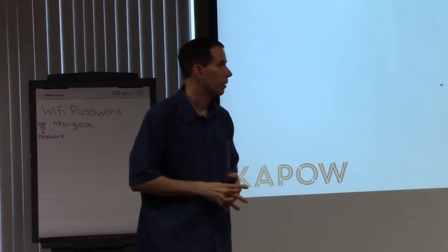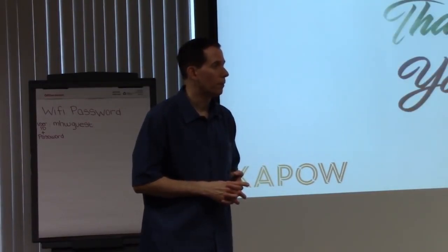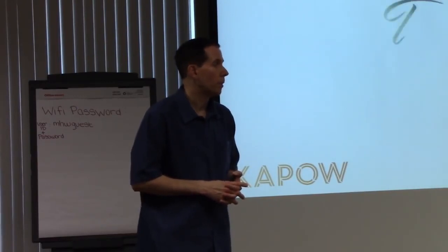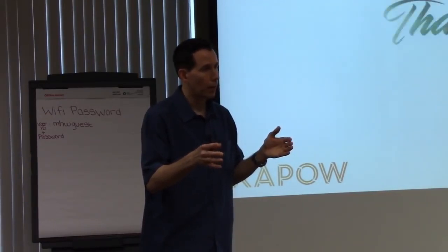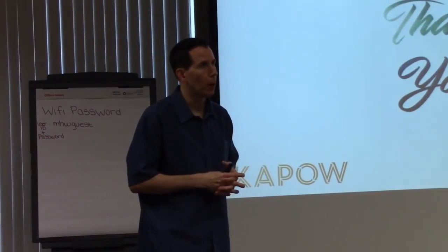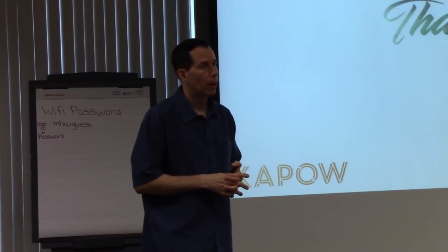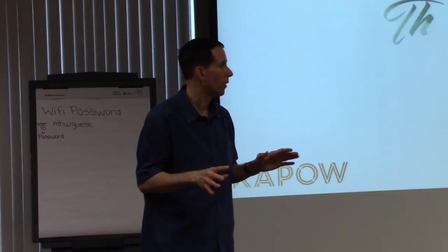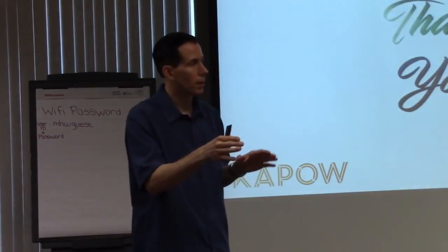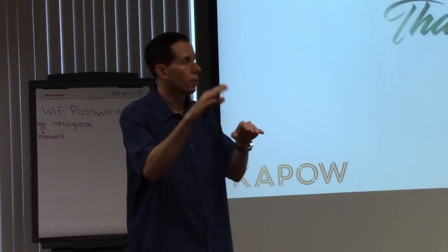It's no one particular thing, but if it's working for your group, if you feel that's enough time, it depends what your delivery is to be. We've had to split things up, but I've gotten away from it. I will tell you that, because I don't like having something partially complete, because that's only a partial design. I'll first ask that we can design a good chunk of it in this sprint. Let's not start building until we get a good feel of it. We'll go into the next sprint and continue on with the design that we pick up. And it might be just enough right there. Okay, let's go for it. Let's go ahead and build it at that point.